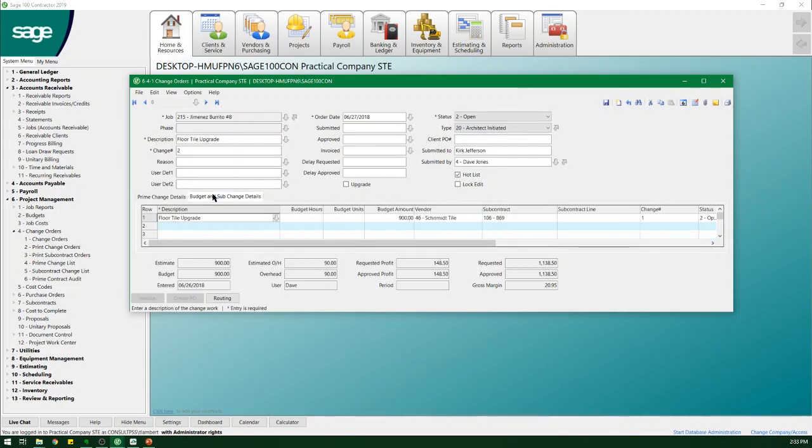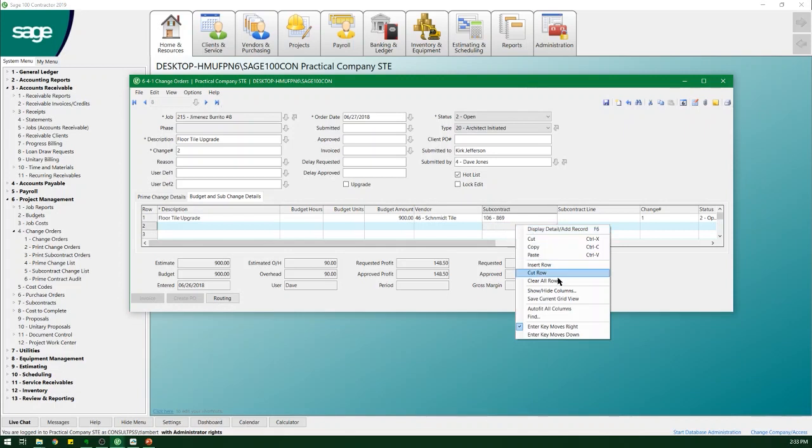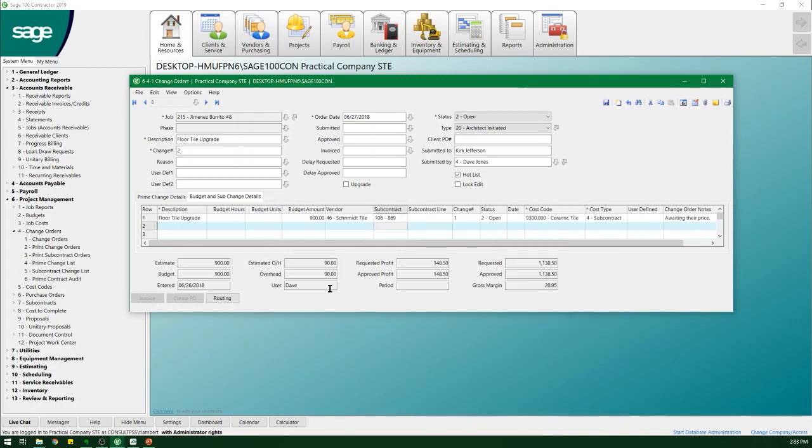It's the budget side. I can look at what's going on in my budget here, what cost code I need to hit. This one actually has a little more information. Shrink it up. This is my change in budget. I already had a subcontract on this line item when I started the project. So this change actually changed my subcontract. So I record it here.